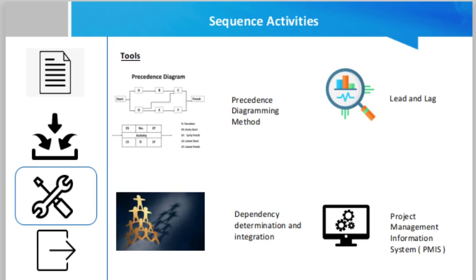Here, a lead may take place if the organizer has prior knowledge about the genre of music that will be used, and starts their search for a DJ proficient in the required genre. But then the music has to be picked out beforehand. A lag takes place in case of a waiting period existing between two activities. For instance, a wait time is required for the wet paint to dry completely before decorations can be hung in a building interior.